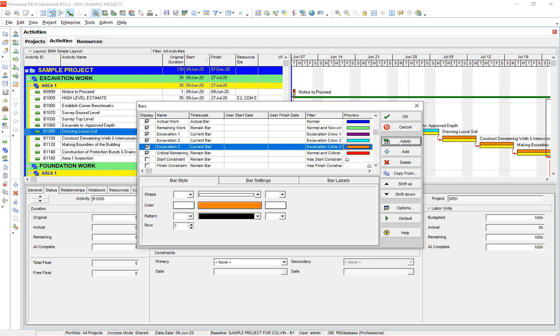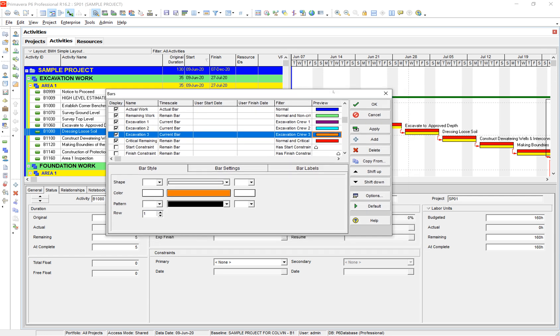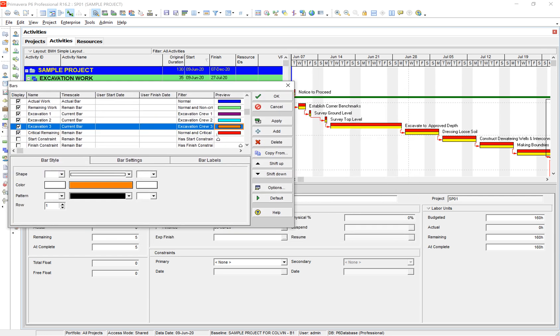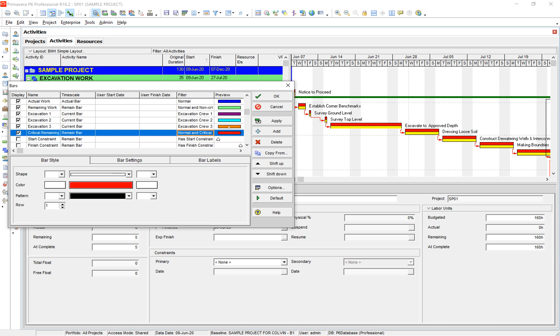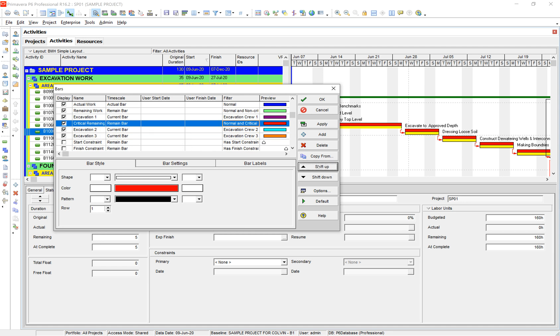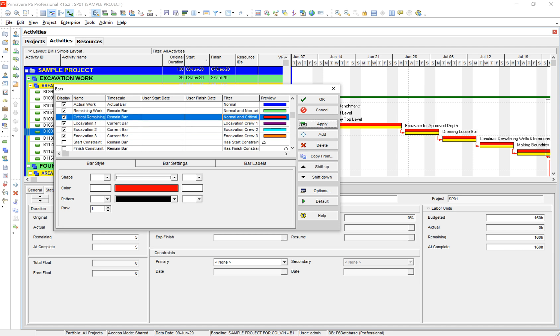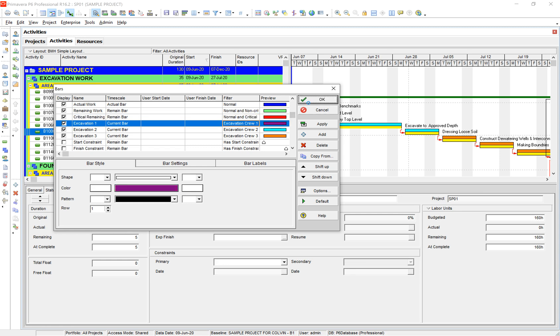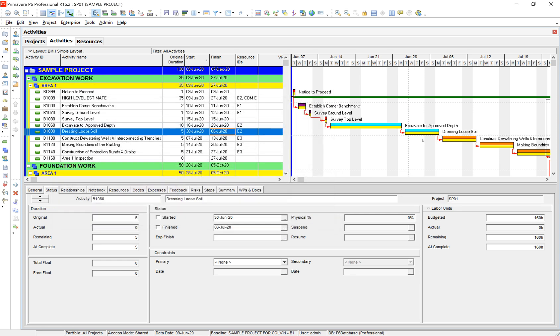And I select apply, you can actually see that when these bars are actually above our critical work they won't actually display correctly. So you have to make sure that all of your bars are actually below your critical remaining work. So as you can see if I shift back up to the top right here and select apply you can see they all come back. And so this is kind of a nice layout that you can use as well and you just want to get a better visual in your project.